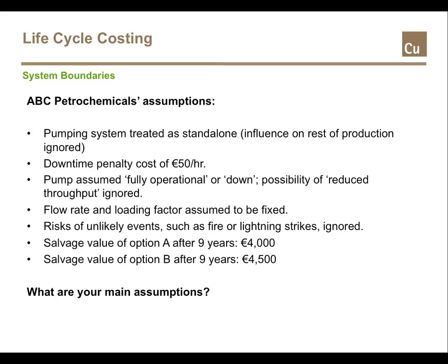He will consider the flow rate and loading factor as fixed over the entire time horizon. Third, he won't take into account consequences from unlikely events such as fire, lightning or flooding. And fourth, he assumes the salvage value of option A to be €4,000 and of option B to be €4,500 after 9 years.